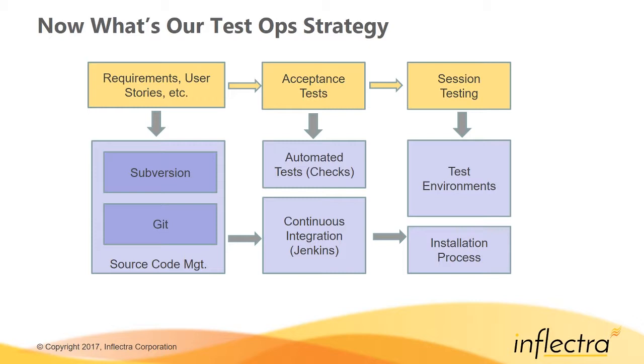And as Elise will tell you, there are many times when it works on all of our internal environments, but not on the customers'. So it's important that we build good test environments. We do installation testing as well, making sure that we're testing everything that the user will have to experience: deploying the app, configuring the app, not just using it.